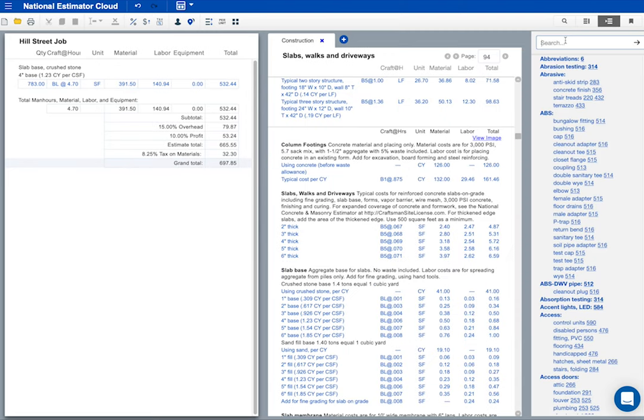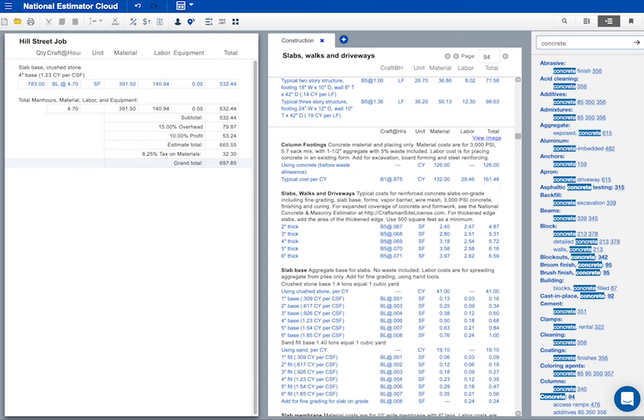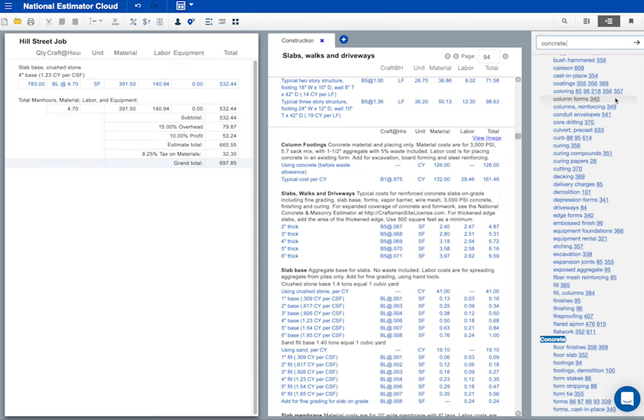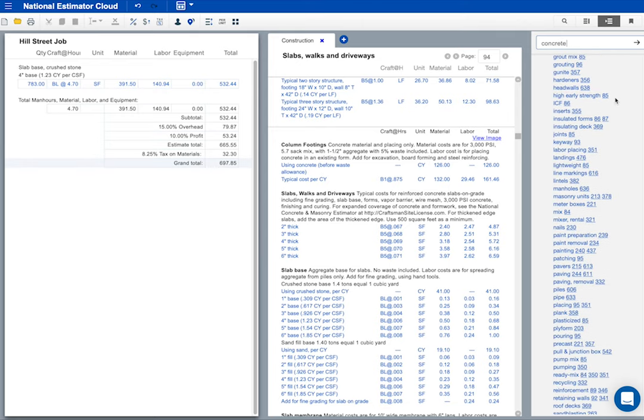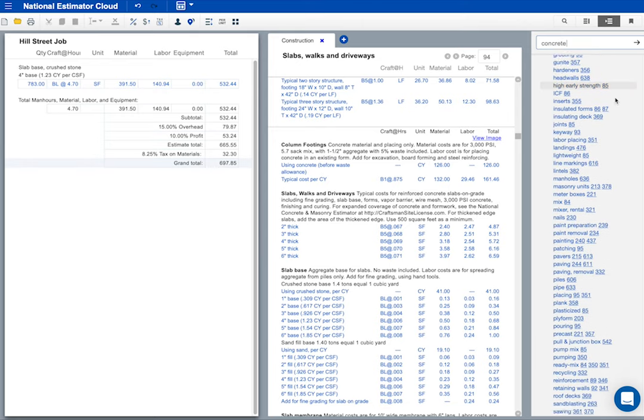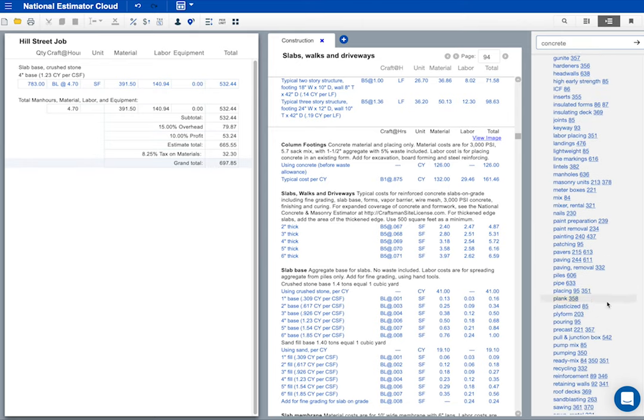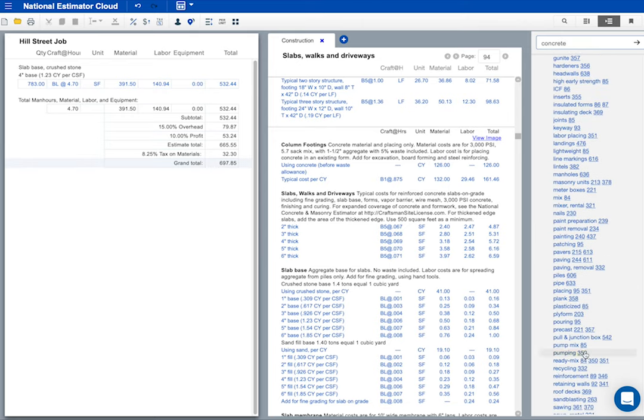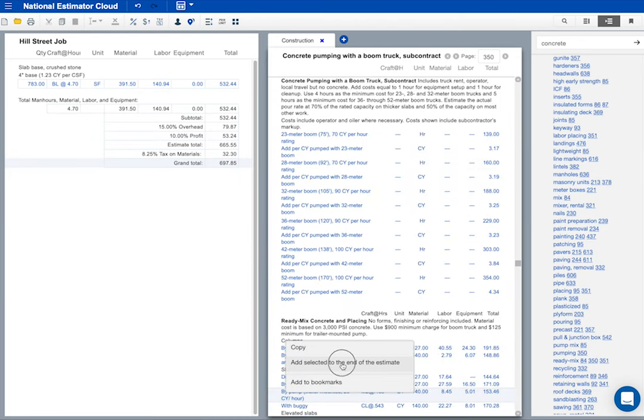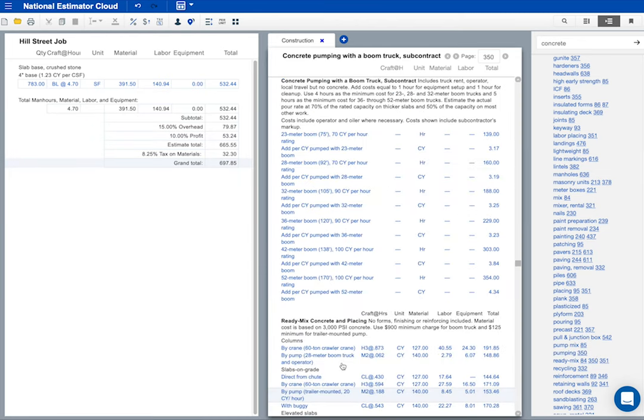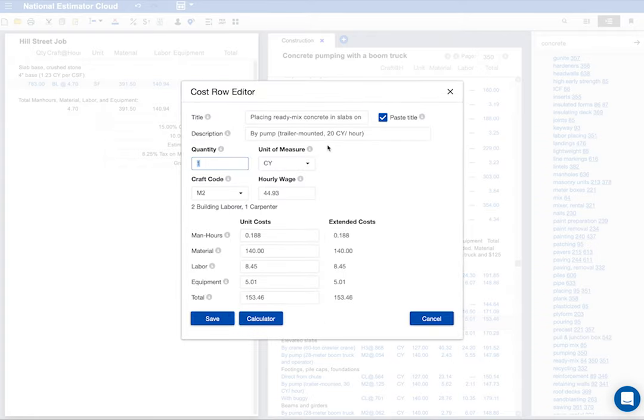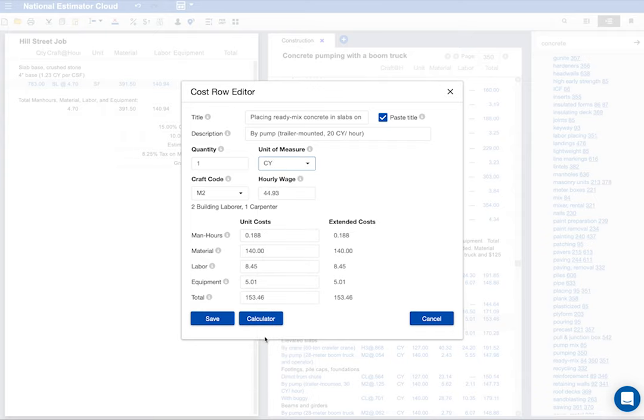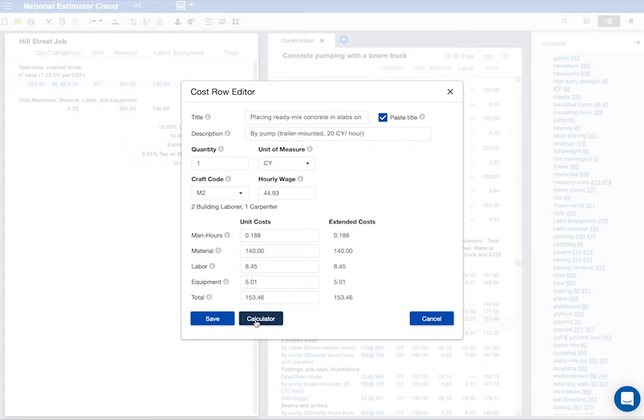Let's put a few more costs in this estimate. I'll start with the concrete pump for this job. All we need for this job is a trailer mounted pump. This is what I want. I'll select it. And right click to copy to the end of my estimate. The slab area is 783 square feet, but the costs here are per cubic yard. So I'll open the calculator and convert 783 square feet of 6 inch slab to cubic feet and then to cubic yards.